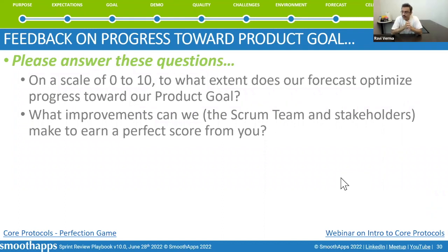The second pattern that we did was in another company, we rotated the time. So maybe there were certain times where it worked for, let's say, Poland, but it was uncomfortable for India and Dallas. And then maybe sometimes it was convenient for Dallas. And then sometimes it was convenient for India, because the message it sent was, we value and respect everybody's time with their family. And just because the funding is coming from Dallas, it doesn't mean that the sprint review will always be at a time that is convenient for Dallas, but inconvenient to everyone else.